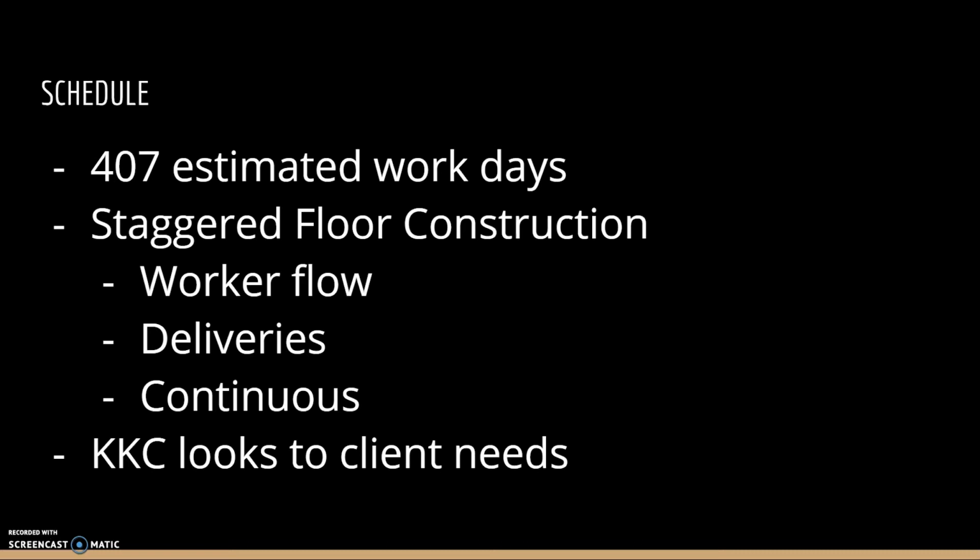And our schedule is really going to be dependent on a critical path that is related to the superstructure, because that's really going to slow down when we can start the next floor and when we can move our workers on to the next trade.